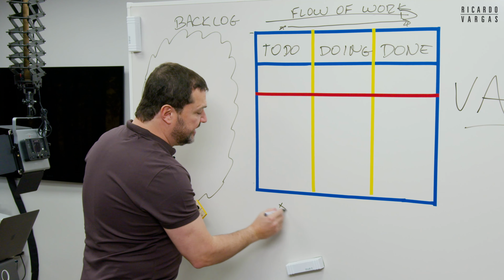Things just start popping up here. For example, tomorrow, let me just change the color, there is a new request. Why? And this new request comes here. Or Zeta comes here. And this will go to this backlog. As soon as things clear here, they start moving in that direction. So this is the basis of Kanban. So this concept of the maximum, because if there is no maximum here, you are not doing Kanban. You are just doing a table that controls different works.